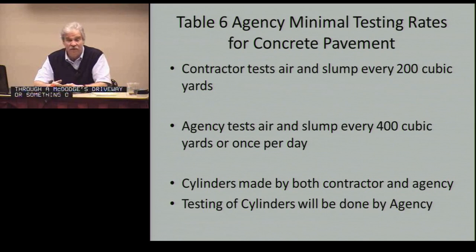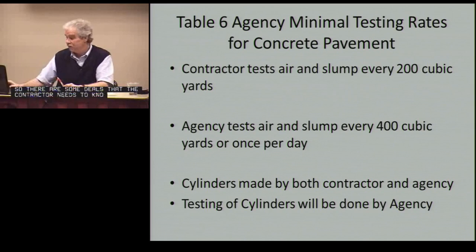Engineers can also require that in the plans. They can say we want this under early strength concrete, this driveway, and it will be tested and dictate cylinders be made. And that's their choice as well, because they're dealing with the public. They're making the deal to rebuild the road and keep the public in and out and keep businesses open. So there's some deals made that the contractor needs to know about, and that's part of that pre-construction meeting or in the bid, hopefully, in the plans.